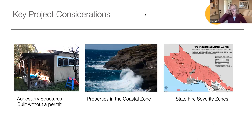Fire severity zones have been established in state responsibility areas governed by the state fire marshal. If your home is in a high or very high fire severity zone, you will need to conform to the 30-foot setbacks from all property lines. This is one of the many things you can research on the county's GIS interactive mapping system, which provides an unbelievable wealth of information — we've not seen a tool nearly this comprehensive in any other jurisdiction we've worked in. We really encourage you to start your research there.